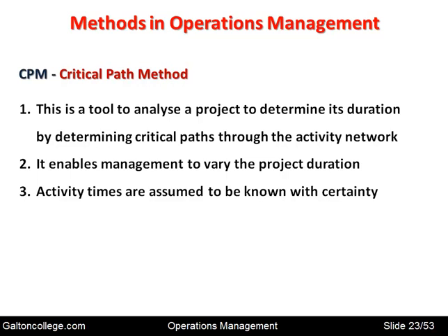The activity times are assumed to be known with certainty. But of course, in the world in which we live, activity times may vary because one operator is faster than the next, or one machine is more capable than the next machine, and so on. So activity times are not always known with certainty. Despite having said that, it's a widely used and widely respected technique, and one which deserves its own class, which indeed there is. So that will be dealt with in a separate class.